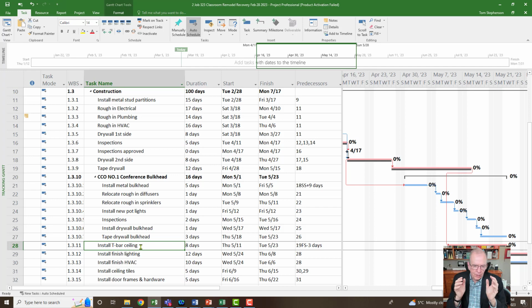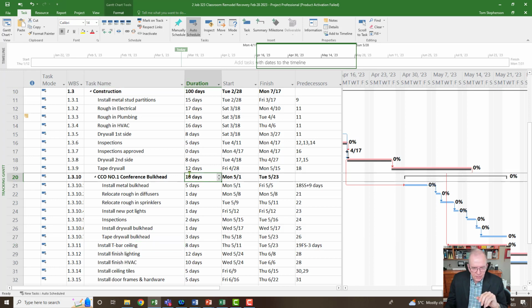And the client is coming up with this bulkhead that they want, or the consultant, and you have to cost this out. And maybe you have a client that does not want this project to be late, but yet they also want the bulkhead. So you want to see, well, is this going to impact us or not, right? Because this bulkhead clearly right now looks like it's going to take 16 days to do. So is it going to impact us by 16 days?